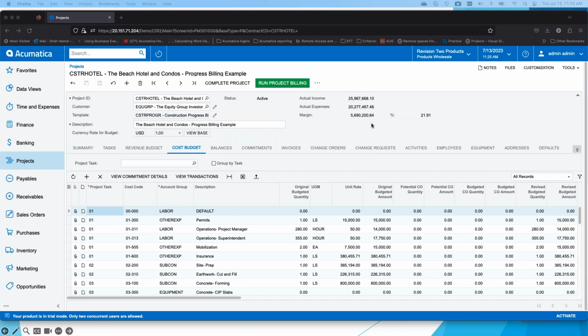So whenever we do a change order, ideally we want to do it on both sides. If we're doing a revenue change, we make the adjustment on the cost budget. But you may have a one-sided case where we're adding cost to the cost budget, but the revenue is not changing. Typically, this would be for a fixed fee piece, and that would be something we would normally run into.